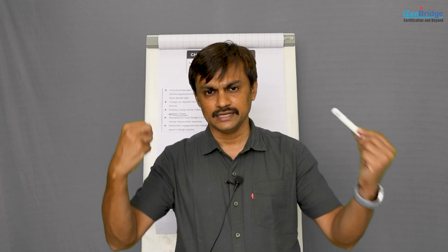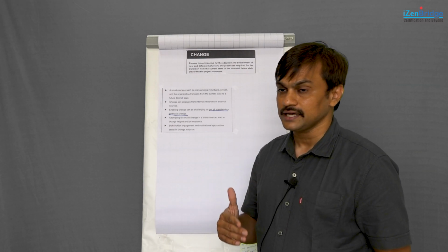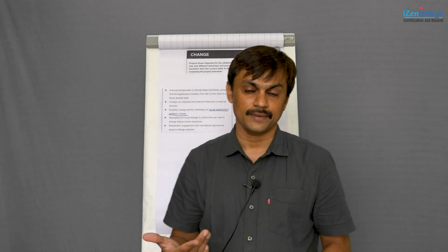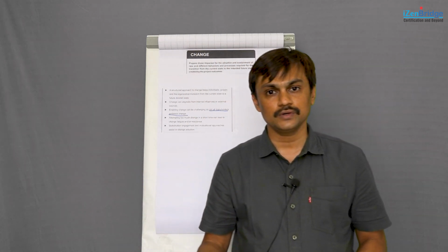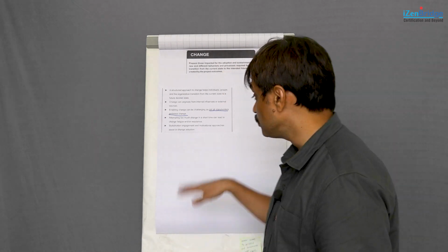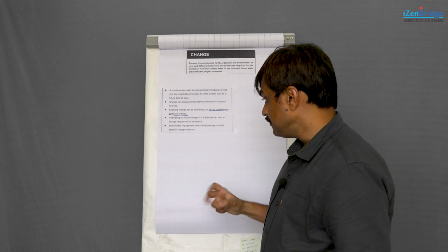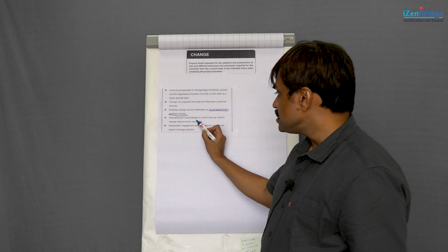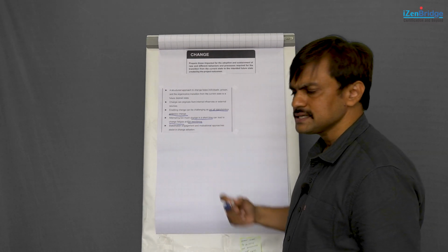There will be a few who may be excited to bring the new change, and they may really want to adapt to the new change or new idea. So, different people at different points in time may react differently. Why do I say different points in time? Initially there could be a high resistance environment, later on when some unit has migrated and started using it, the resistance may start going down. When say 60% of the people have started using the new robot, then the resistance may go down further. So, we need to deal with different stakeholders differently based on time and context. Now, attempting too many changes in a short duration can lead to change fatigue and resistance.